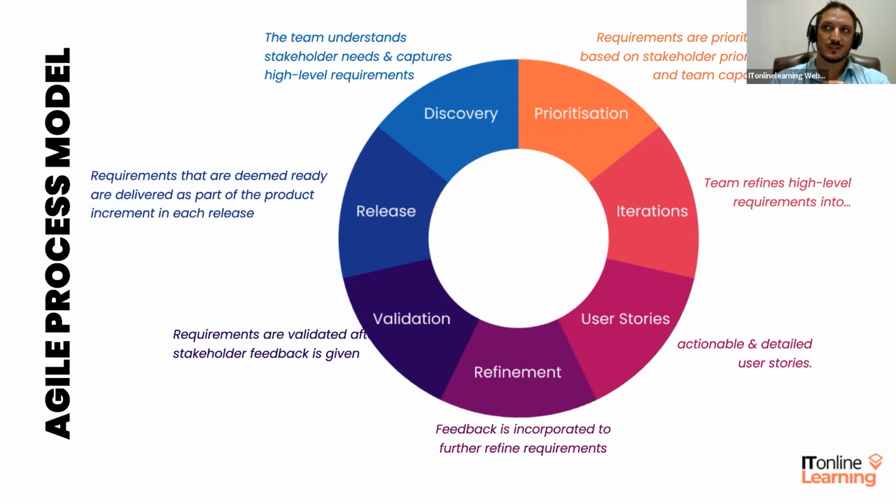The requirements will be chosen in the first release, what is going to go into that cycle of development, and then it will be built into the system. Then after the next review, the requirements will be reevaluated, and the process continues until the system is built. This also encourages stakeholder engagement and collaboration throughout the project, which helps to ensure that the final product meets its needs.